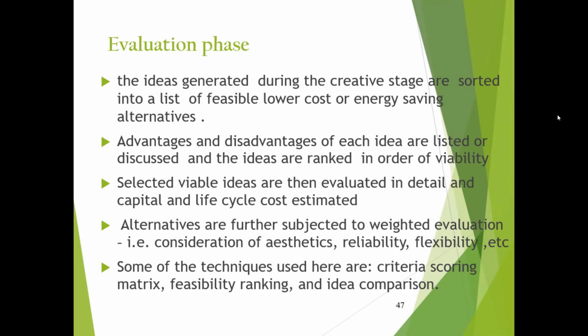Selected viable ideas are then evaluated in detail, and capital and life cycle costs are estimated. Okay. So for those selected viable ideas, we need to do a detailed evaluation based on initial cost and life cycle cost, right? Here we evaluate using some techniques.